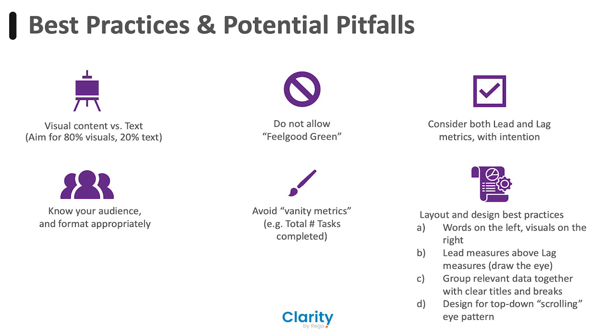For example, we could display on there the total number of tasks that we've completed, or the total number of tasks we completed since our last status report. That's accurate, but it doesn't tell a whole story. For instance, those tasks that we completed, how many of them were completed on time? How many of them were late? How many tasks are remaining? The number of tasks by itself doesn't really tell us a lot. It's missing some things. So it might look good to say we completed 12 tasks since our last status report.